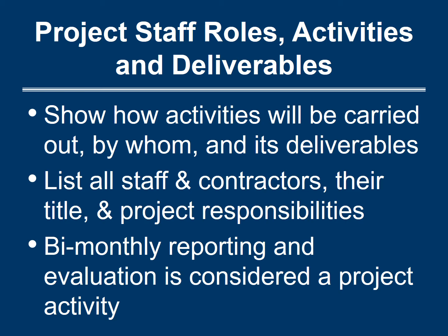You will list the key project staff by providing their title, a description of the qualifications needed for that position, and describe the activities they will be responsible for carrying out in the project. It is important to remember that evaluation is a project activity, and you should put some thought into who will be responsible for evaluation activities, including designing surveys, analyzing findings, and possibly report writing.